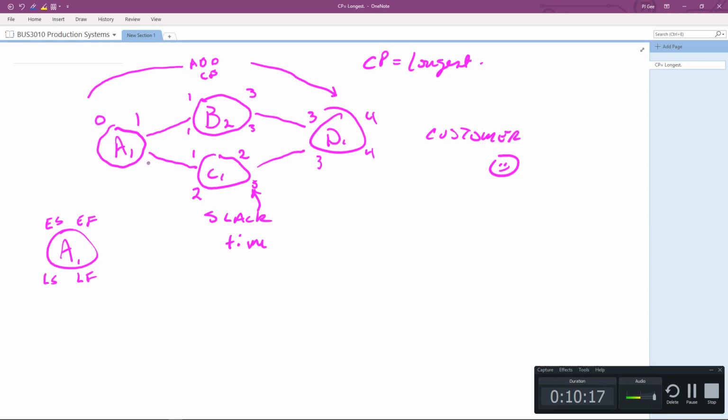Okay, so now when we have to finish the model here, coming backwards through the system, we have to look at the late start times. And we want, in a sense, to take the worst case and bring that down. It's going to be the smaller of the numbers. 1 minus 1 is 0. And so you'll see that the first and last events or activities, their early start, early finish should match their late start, late finish. These numbers will be the same.